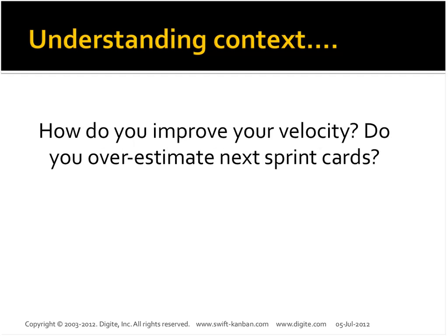Another thing which comes up very often is how do you improve your velocity? Over a period of time, obviously you can find ways to deliver better, but teams also sometimes start overestimating their cards just to meet the sprint commitment, and no one is really sure whether the estimation is fairly accurate or not. Thereby the whole velocity metric itself is pretty subjective.